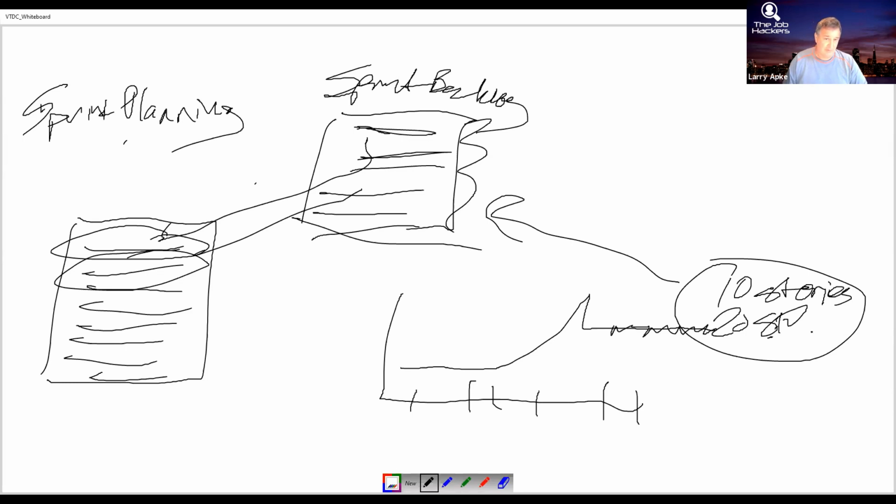And then one other thing that we would do normally during this, because I'm working with the team, and I'm trying to tell you as close as possible to what we're currently doing with the 2 teams I work with, is once we have that sprint plan, we're going to take a look at it. We're going to prune it. We're going to say, we want to get some more in there. Is there something that needs to come out of there? Like if we put 40 points in there, maybe we need to take 20 points out. What can come out? And you're going to do that. It's kind of a horse trading type of exercise.